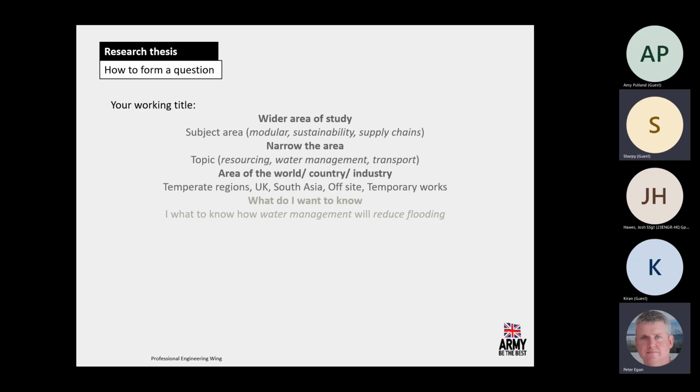The way we build stuff in StratCon is slightly different from the way we build stuff in the rest of the UK because we use UK contractors. Most of our contractors who do StratCon projects are compositions of different contractors who are willing to work in that bit of the world. And we don't get the same trade skills by far in StratCon projects than we do in UK projects. The quality is just taken that it'll be less in certain parts of the world because we have security issues. So there's loads of little nuances with StratCon projects you don't get in normal UK projects.